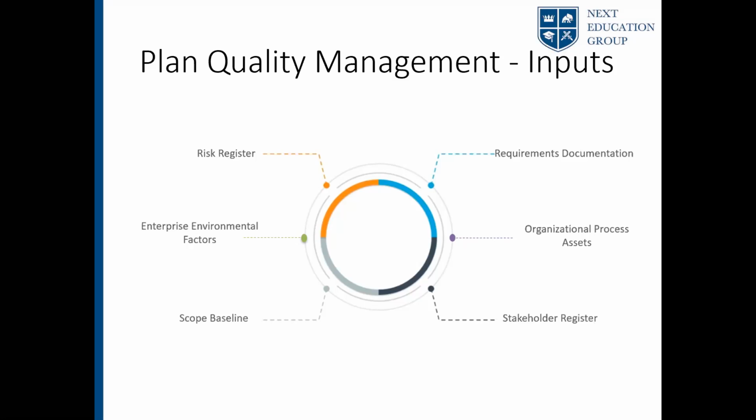Yeah, I think requirements documentation is like what the customer wants. Okay. Whereas the scope baseline is the agreed requirements that you decide to provide from the project. Perfect. Thank you for that. So as Yanushka said, requirements documentation is the requirements that you obtain from the customer. Scope baseline is the agreed scope that you're going to deliver within the project. Not all the requirements might be scoped in. So scope baseline would probably be a subset of your requirements documentation, right?